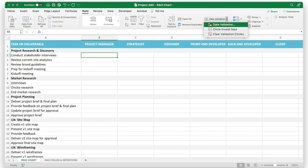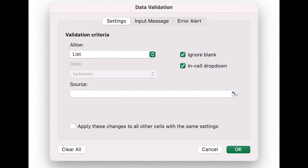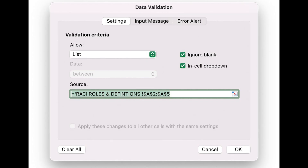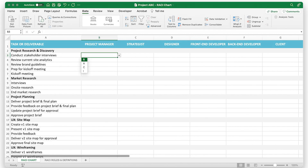Now, go back to your main worksheet and click in the first open cell of your RACI chart. On the ribbon, click Data, Data Validation to insert a drop-down list with RACI roles. On the Settings tab, choose List under the Allow menu. Click into the Source field, then highlight your data range with your RACI options from the RACI roles and definitions worksheet you set up in Step 3. We highlighted cells A2 through A5 in this example. Verify that your data validation settings are correct, then hit Enter to add the drop-down list to the selected cell. Copy and paste that cell to apply the drop-down list to other cells in your RACI matrix worksheet.